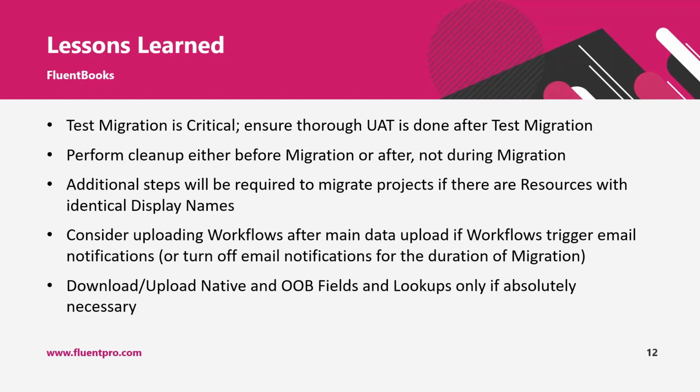And also thorough UAT should be done after test migration, so that if there are any issues that users might find, they would find them after test migration, but not after prod migration, like a day prior to go live. If there is a necessity to perform a cleanup of the source environment, it is better to do this before the migration starts. In this case, you will have less data to be downloaded and uploaded.